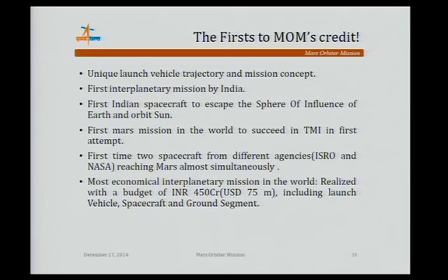And the most economic interplanetary mission in the world, realized with a budget of around 450 crore Indian rupees, around $75 million, including launch vehicle, spacecraft and ground segment development, all total costs together. Next.